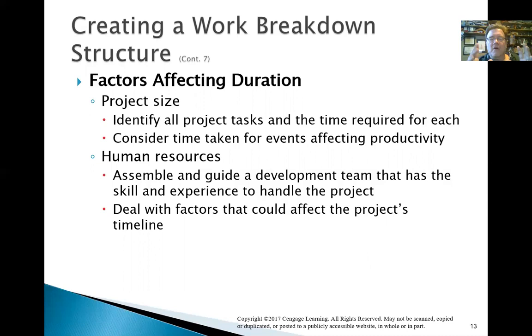The lesson in there is that you can put 10 people on a project, but if you can't run a lot of stuff in parallel, you're probably just wasting resources and not shortening the scope or the time of the project. So be aware that putting more people on a project doesn't necessarily speed it up. And I can't remember, it's in the book, but there's a name for the effect where if you put people on a project, you can actually delay the project. Like if you're already in the project and you start to add people to it because it's running slower, you're actually going to end up slowing down. So just be aware of the human resource angle with project management.